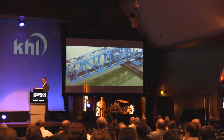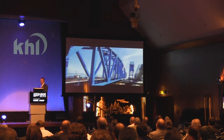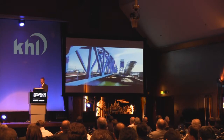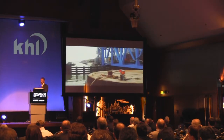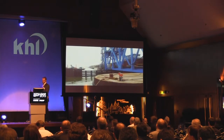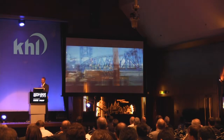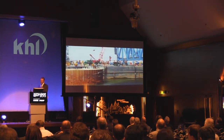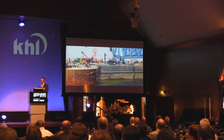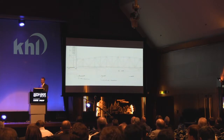While the barge was clearly inside the channel, Burkhalter had to make sure that the bottom of the bridge would not hit the tops of the existing structures, including the dolphins and the rail itself. The goal was to vertically clear the structures, but not by much, since pumping that much water in and out of the barge took a considerable amount of time that we didn't have. The vertical clearance between the bottom of the bridge and the top of the railroad was a meager 9 inches, which brings us to the next challenge.